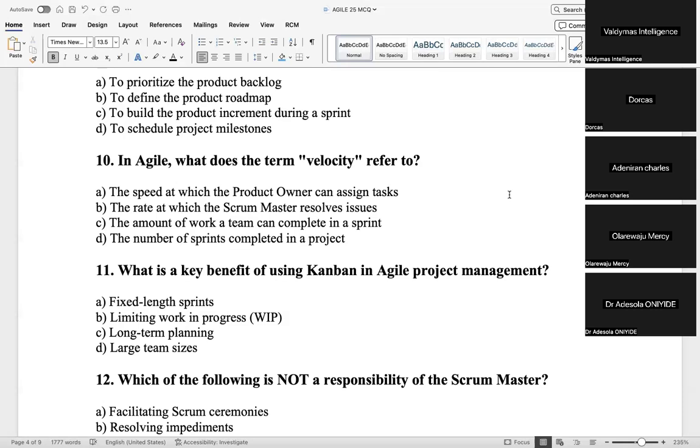Excellent. The reason why I want you to be careful about task is that you can break a story down into task and subtask. Sometimes you have a story and you have to break it down into task and subtask. Sometimes too, when you become professional, management tracks the Jira board at the story level. So because of that, some of us that are Scrum Masters, we change some stories to task.